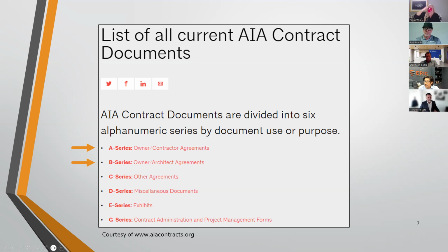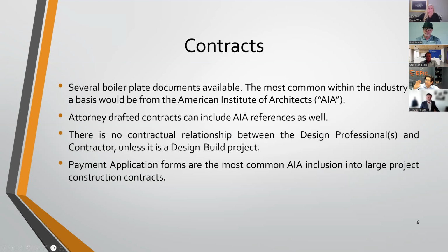While we're on this topic, one important thing is understanding what exhibits need to be part of this, which I think is really critical from an engineering standpoint for us to do our job well. I've unfortunately had the privilege of being on a couple of projects where we did the design, we had everything going, and then the association signed a contract and did not include my plans as part of it.